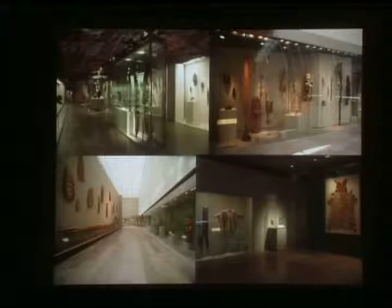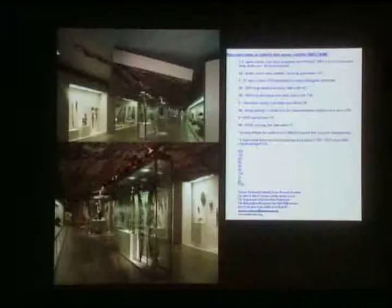Recalling my experience about a decade earlier working with the former head of textile conservation, Nobuko Kajitani, and conservator Elena Phipps on the development of the Textile Conservation Laboratory in the Rati Textile Center, I knew it would be critical to have accurate measurements of all the large objects involved in the move. Unwilling to rely on database measurements, over 350 large objects were measured in 3 dimensions, and weight estimates and mounts were also recorded.